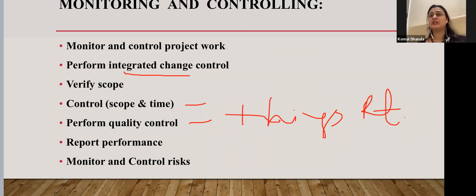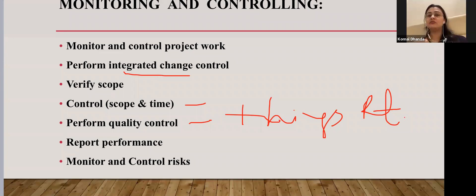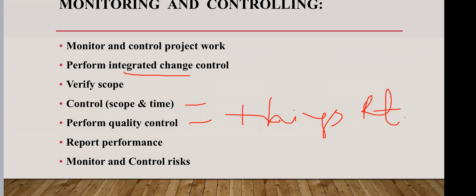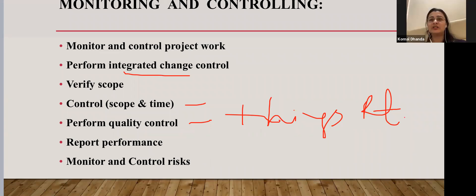Reporting performance means communicating to everyone involved — top management and subordinates — how the project is going and what progress is being made. We are collecting, processing, and disseminating information regarding the performance of the project: the stats, the progress measurements, and the forecast, communicating everything to all the stakeholders who have a stake in the project.